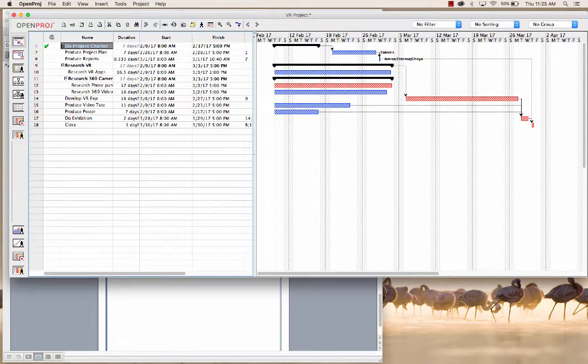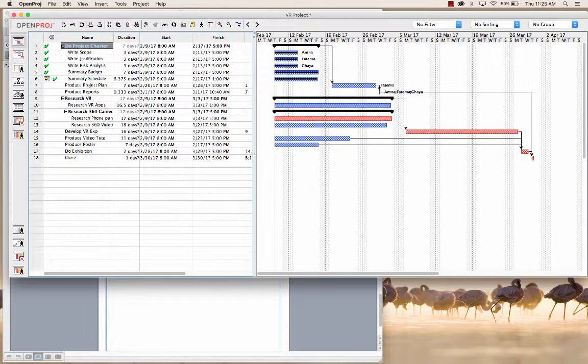So we can close that up. We don't need that anymore. Same with the initial project plan. Once that's done and we have that submitted, then we say each task is done 100% and we'll get the green arrow there. So by monitoring each week, at the end of each week, the project manager for that week can look through the plan and take a grab of what's been completed in that week, what's halfway done, partially completed. And so we get a sense of how we're monitoring the project.